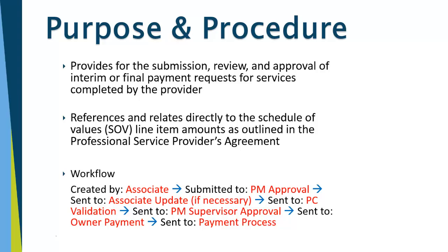The workflow is created by the associate or the architect, submitted to the PM for approval. It can go back for update if necessary, then sent on to the project coordinator for validation, to the PM supervisor for approval, and then to owner payment and payment processing.